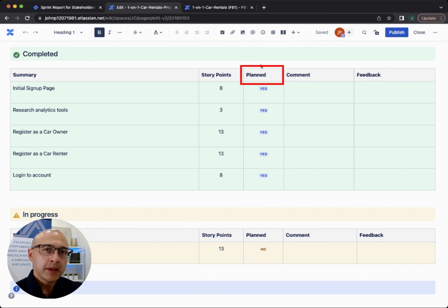And what can happen is that means that the team doesn't complete their original plan that we had communicated to them. So when they see these unplanned items, it helps them understand why we may not have completed the original plan, but it can also get those stakeholders to help you and your team. They might notice that there is a lot of unplanned work from certain areas within the organization, and they can help find ways to reduce it.